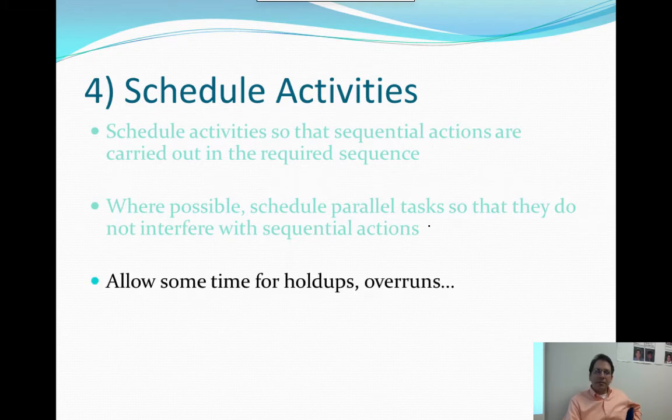And then any project's always going to run into some snags. So, I wouldn't say I want to paint it the day before finals. So it's nice to give yourself a little bit of extra space at the end. And then if you need it, you can maybe have a little extra thing. So maybe, if time permits, you put a second coat of paint on it if that's not necessarily critical. So I usually like to kind of, what they call, pad the project a little bit at the end, just to either do some finishing touches. Maybe your client has a couple modifications that they've wanted to make along the way, or you ran into some problems. You go to the hardware store and they don't have wood that day, so they say, "Oh, we got a shipment coming in tomorrow," so now your whole project's delayed a day.